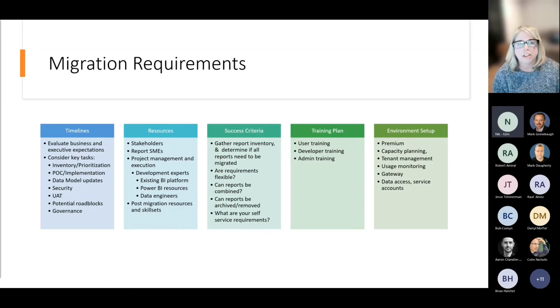And then make sure when you're going through this project plan, you might have a set of experts set to help you migrate, but don't forget that at the end of that project, you've got an environment that's up, it's running, and it's going to need to be built on. And you want to make sure you're planning for all of the resources you're going to need going forward. Admins, people who understand the setup and the environments, that type of thing.